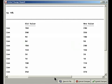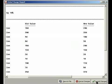30 days add 10% gives me 33 days. Now, I can review all of these changes, and if I'm cool with them, I'll click down here, Commit Changes. Those changes will be committed to the project, and I won't be able to undo them. By the way, a little caveat here, it's always a good idea to make a backup or an export of your project plan before you run a Global Change, just in case you want to go back to how it was.